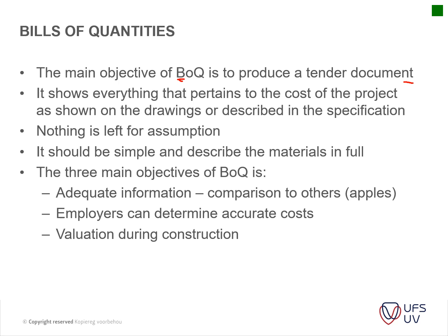For instance, if you've got plumbing, you have plumbing a first fix and a second fix. So your first fix is usually your pipe work, chasing in through walls and so forth, whereas your second fix will be your sanitary fittings, where you get your toilets being installed, your baths, your hand wash basins, etc. So although it follows a logical flow, it doesn't follow exactly according to the program. So just bear that in mind.